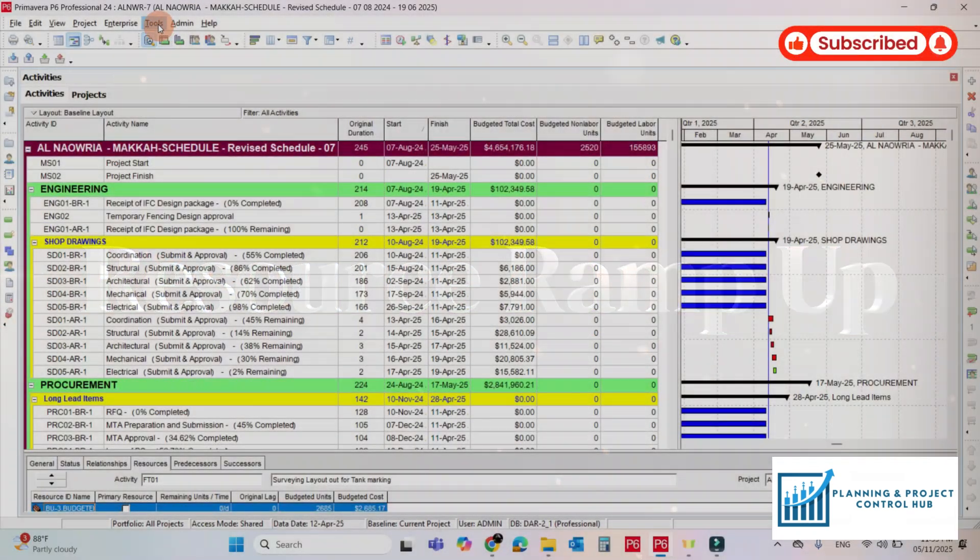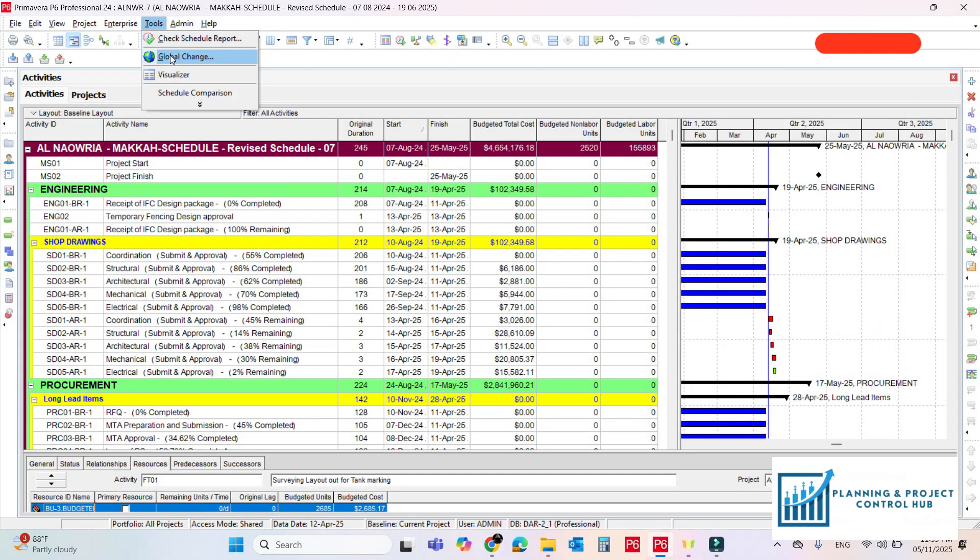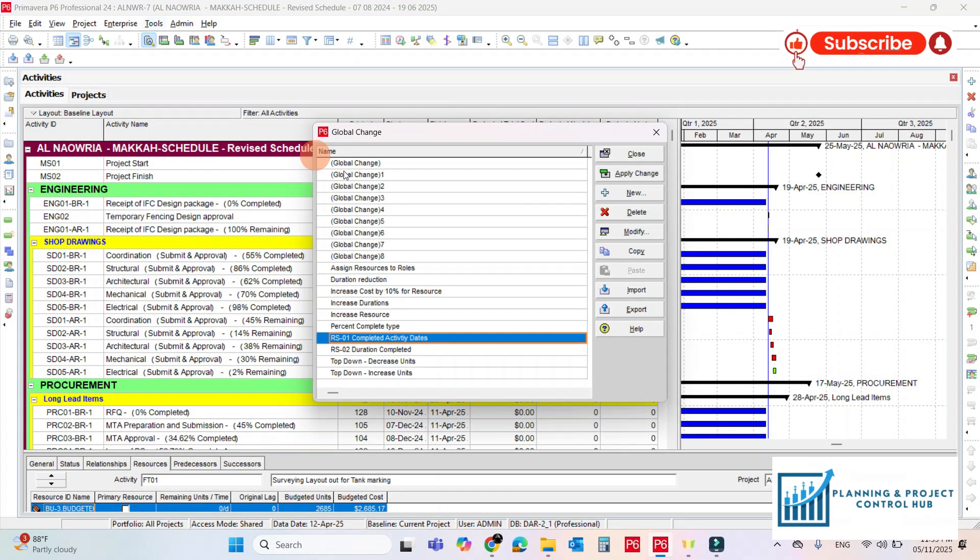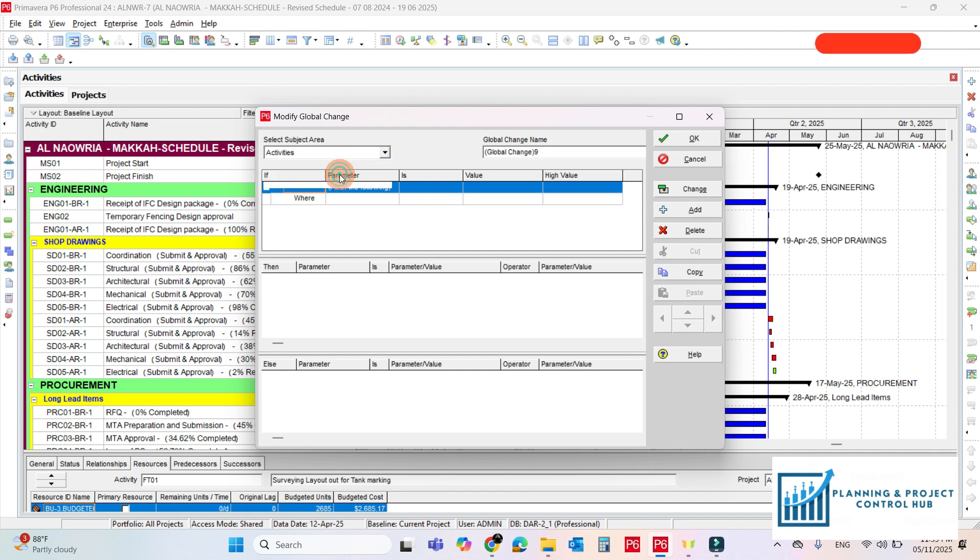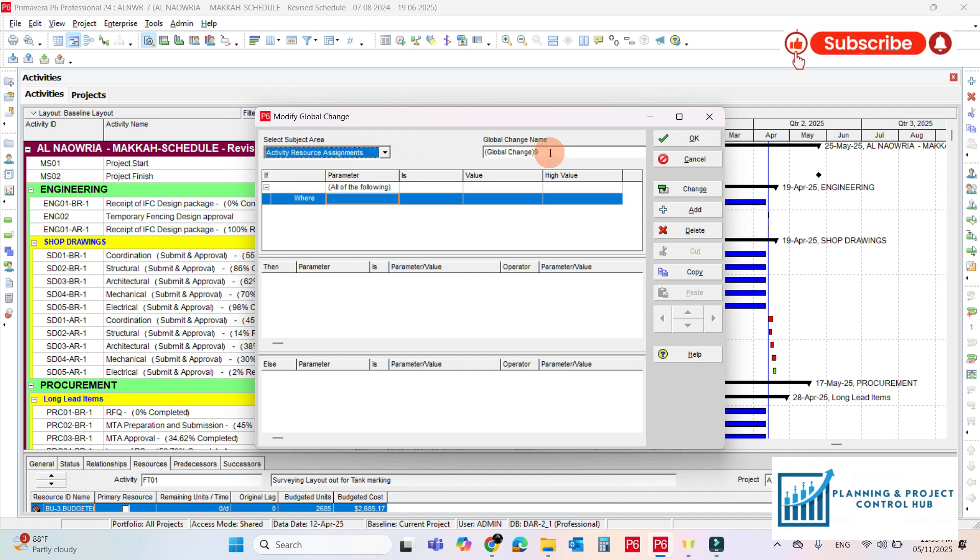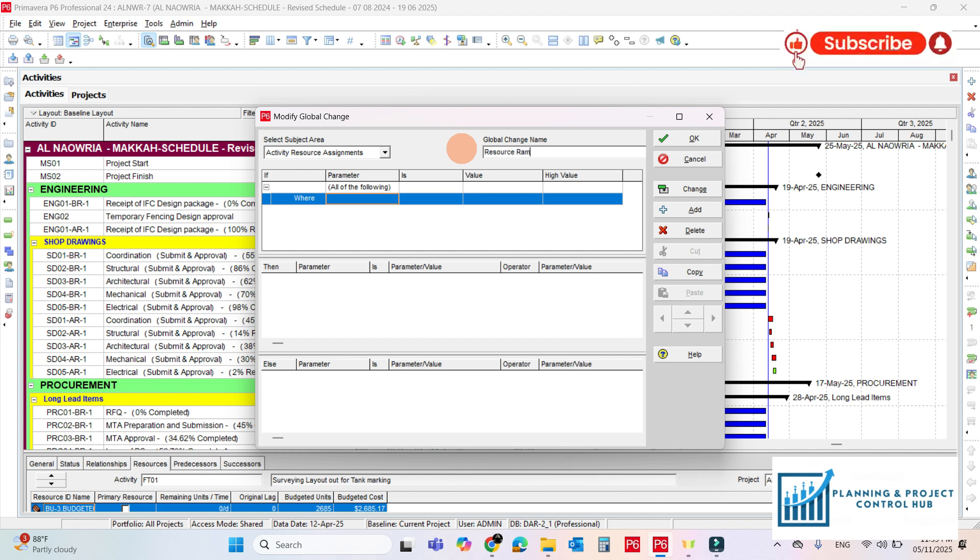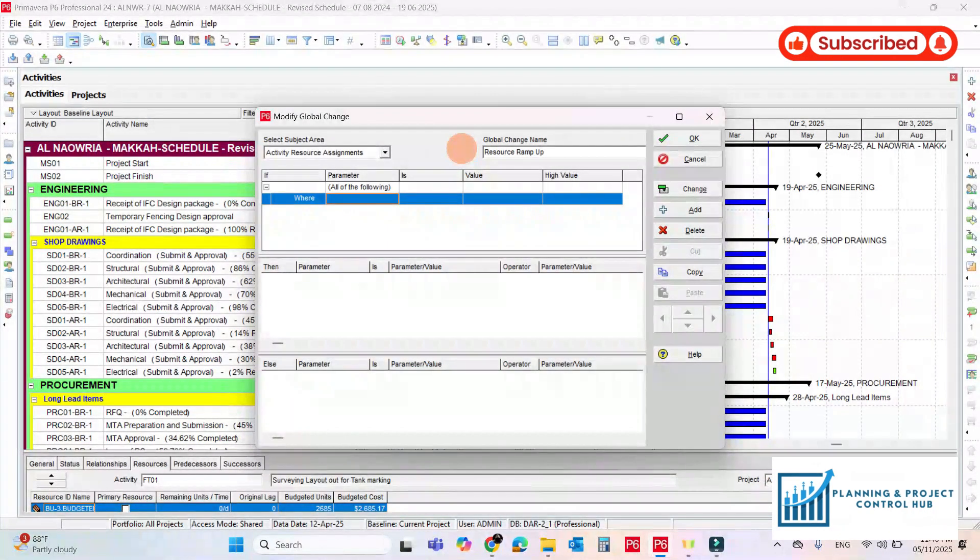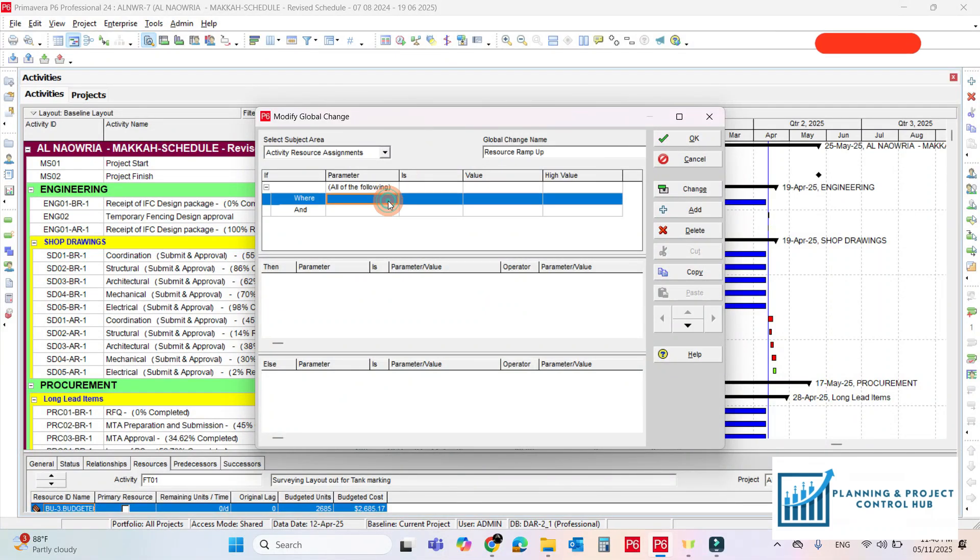Go to the tools. Global change. Open new. And it should be activity resource assignment. Rename it Resource Ramp Up. Add the condition.